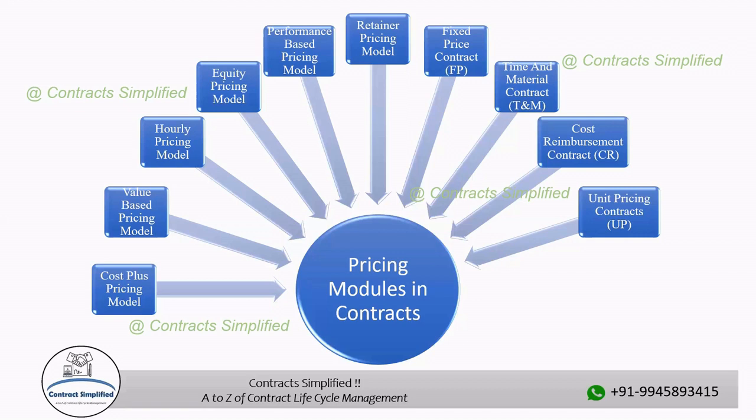However, there are some potential drawbacks. Managing and verifying quantities of work completed can be complex and time consuming. Disagreements can arise over quantities measured or the appropriate unit prices, and while they accommodate changes, frequent or significant changes can still disrupt the project.